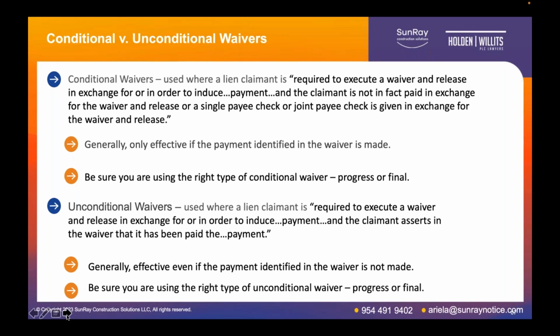When we're dealing with conditional versus unconditional waivers, and specifically conditional waivers, we want to make sure that we're signing the right type of conditional waiver, either progress or final, as the condition warrants. And that brings us to unconditional waivers.